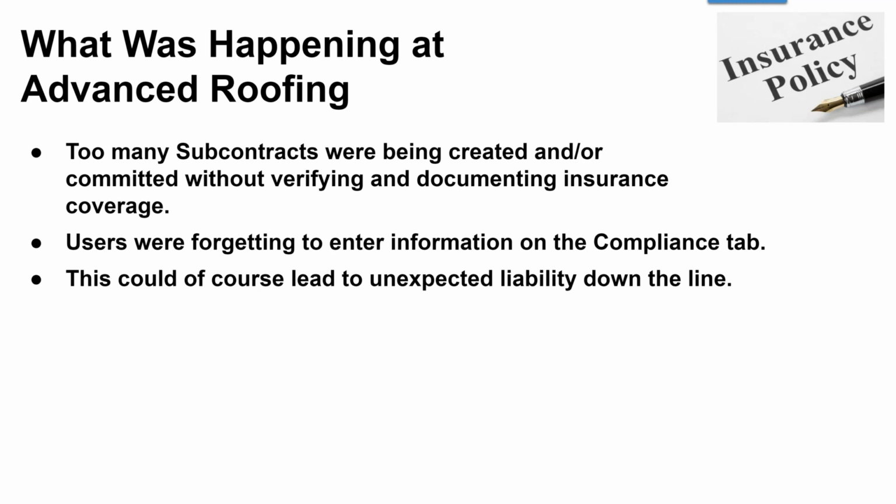What's key here in my thinking all the time is that the people creating the subcontracts aren't the ones whose job is affected by the lack of the data. They have no immediate investment in remembering to get that data entered. It doesn't affect them, it affects someone else. And that's one of the things that humans always have trouble remembering, is something I'm doing for someone else.